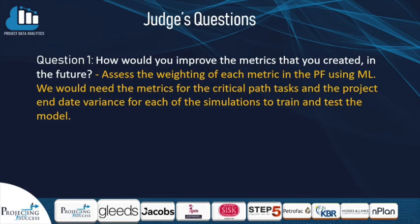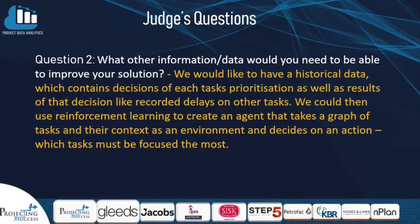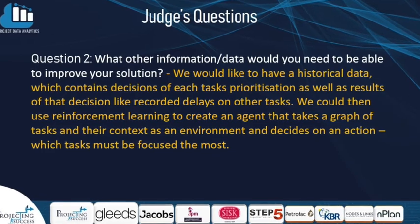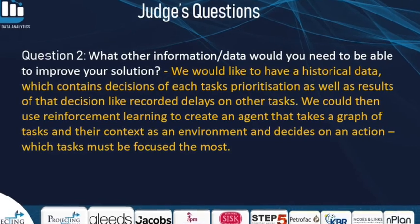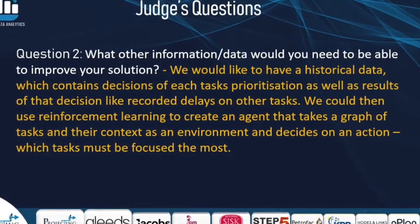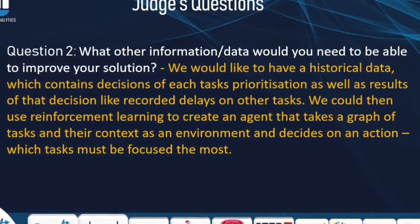To improve our metric in the future we would like to add weightings to each of the metrics using machine learning. However, to do that we would need the metrics for each of the critical parts and the project end date variants for each of the simulations processed by the model, so we can train and test our model. We would like to have historical data which contains decisions of each task prioritization as well as results of those decisions, like recorded delays on other tasks. We could then use reinforcement learning to create an agent that takes a graph of tasks and their context as an environment and decides on which task must be focused on the most.